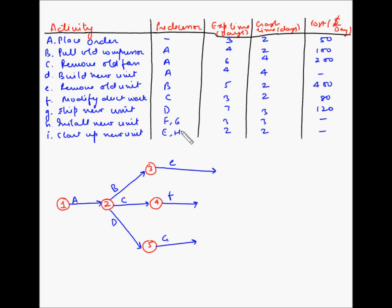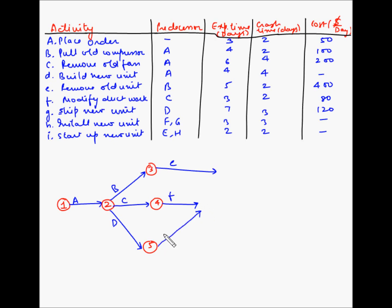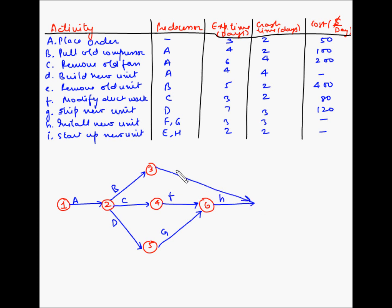Now H is dependent on F and G, so G has to merge into F. Let us modify this — we will draw G and then draw the ending node. Let us say this is node 6, and from this we can start activity H. Next, I is dependent on E and H, so E and H have to merge so that I can start. Now I will draw E, and this is the ending node number 7. From here I can start I and draw the ending node which is number 8. So this is our network diagram for the project.